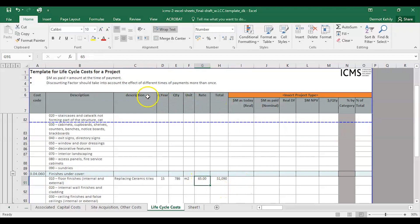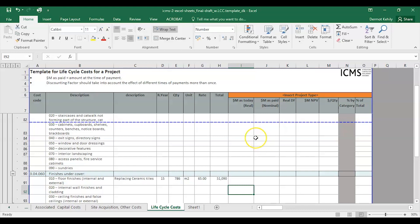There are a lot of columns in life cycle costing, but once you've set it up you have a template you can use for anything — a whole life cycle cost estimate including all items in a cost plan, or even just one item for comparison, like we did before with the rainwater harvesting system versus not installing it, comparing the present value costs associated with each option.